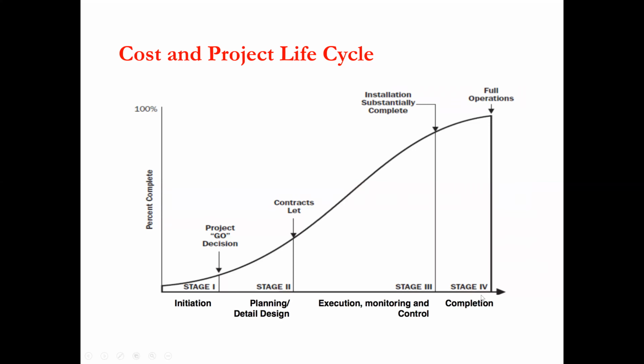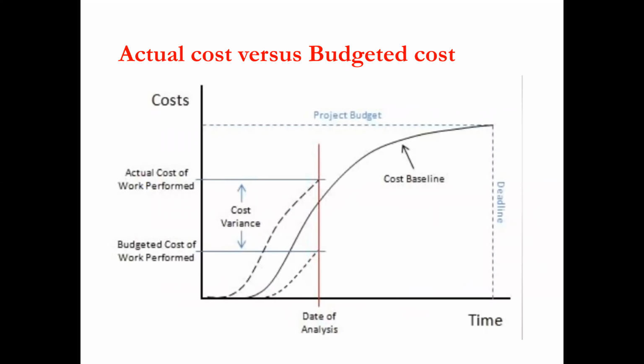So see, it's about cost control. We can make project decisions in the beginning if we want to change or modify the design, or if we want to decide how much budget we have for the project. So we can make changes in the beginning. And then as we move forward, the cost will increase to make any changes in the project.